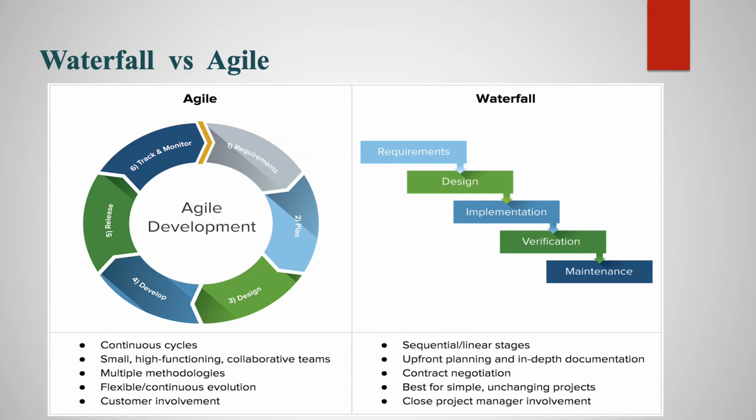So what is the advantage of waterfall? You should understand the advantages. It is one of the easiest models to manage because, by its nature, each phase has a specific deliverable and review process. It works well for smaller projects where requirements are easily understandable, and the project can be delivered very fast. The process and deliverables are really well documented, so it is an easily adaptable method for shifting teams.